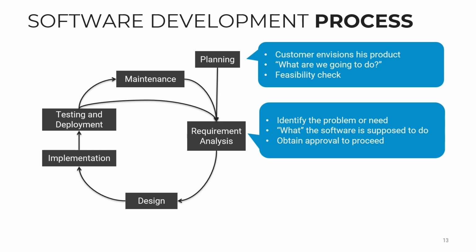This is the requirement analysis phase, and in this phase, you might need to hire system analysts or professionals to discuss with the customers and the users what they need, what they want, and what it looks like. Here you might have a plan, a set of requirements, maybe some UI, maybe some UX design, to collect the ideas and make sure this is the concrete thing that we are going to do. Maybe not 100%, maybe like 30, 40%. And then with this detail, you can start thinking about the budget more precisely.